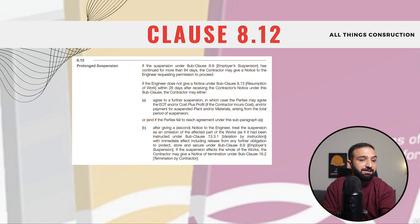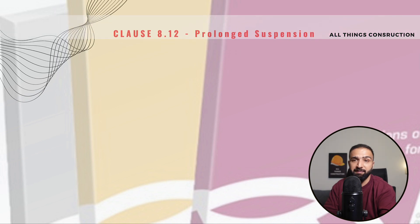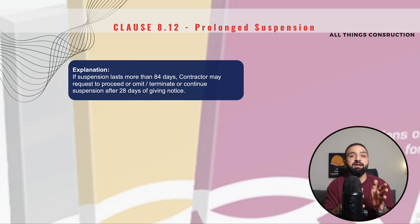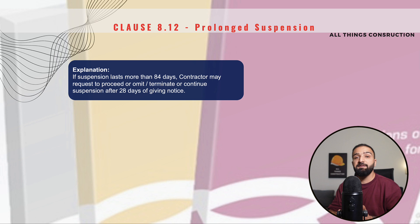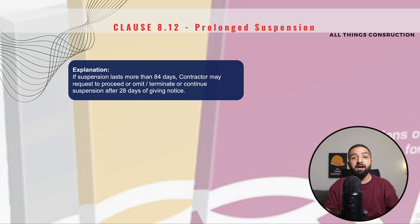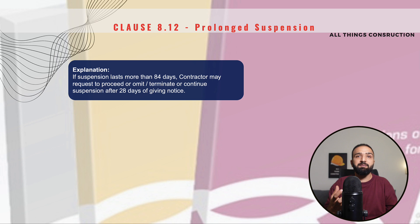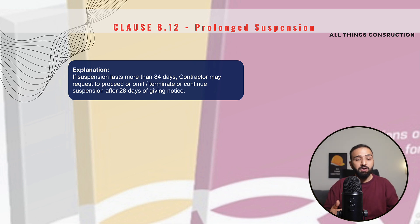Clause 8.12 is Prolonged Suspension. This sets a timeline on suspension. If the suspension continues for more than 84 days, we contractors should write officially to the engineer and ask whether we are okay to resume the works. If the engineer asks us to proceed, we will proceed. However, if the engineer does not respond to our notice within 28 days, we can write to the engineer that we don't want to do these works anymore — we can terminate a part of the works, or if the suspension governs the entire project, we can also terminate the whole project. This protects us from being suspended indefinitely and having our resources and money tied up in the project for a long period of time.